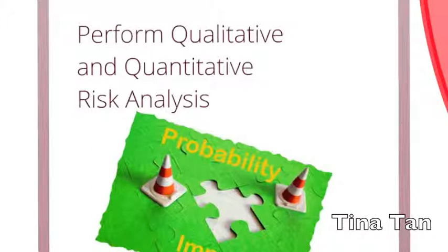Ranking risk becomes extremely vital when dealing with risk management. This process assesses the priority of the risks by looking at the probability of occurrence, the overall impact, and the time frame to respond. Qualitative risk analysis tends to be the most time-effective and cost-effective way to go about doing things, because it looks at the overall quality of the initial assessment and information gathered.